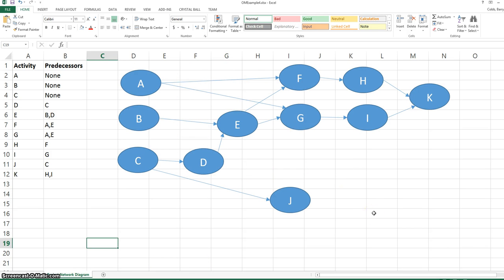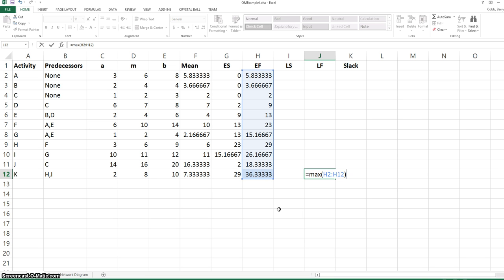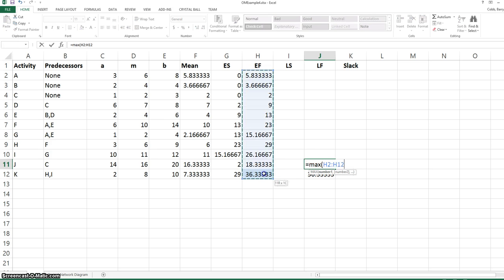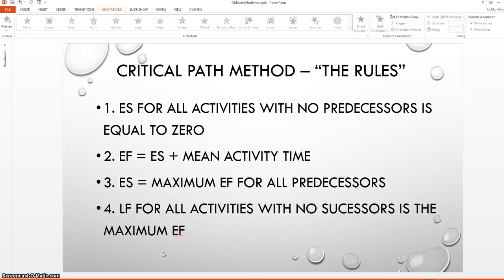In our project network diagram there are two activities that have no successors — these are the completion activities J and K. For those activities, the late finish time is equal to the maximum of all the early finish times. We use the max function because this makes the model flexible, since the maximum early finish time could be anywhere in the list. This is the fourth rule for the critical path method: the late finish for all activities with no successors is the maximum of early finish time.